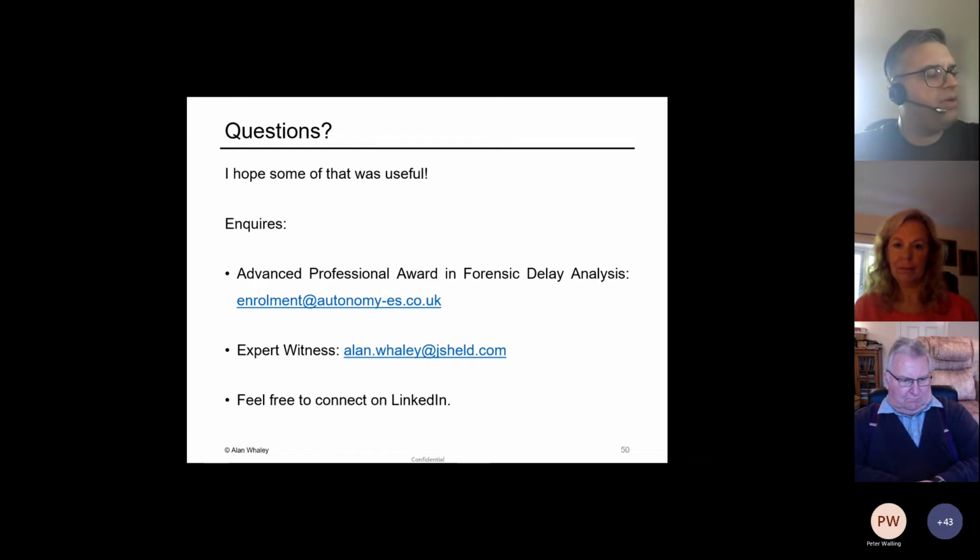So a long answer, but I think it really depends on the nature of the event. If it's a single discrete issue, yep, prospective analysis, that's exactly what the NEC requires you to do. If it's a big kitchen sink final account where the parties are in dispute about everything and haven't really done a proper contracts administration, then I'm afraid the most efficient solution is to look back at what happened.